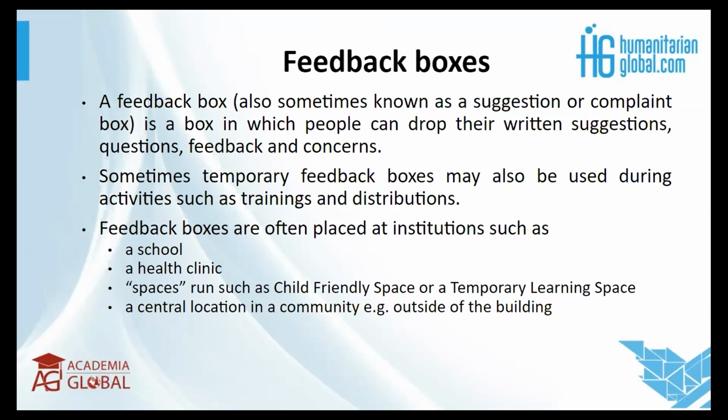On that note, actually, the feedback boxes, especially for schools and health clinics, shouldn't reach a whole seven days, a whole week, before being opened, because there could be sensitive issues of child safeguarding, issues of abuse, issues of rape, which could be written down and not attended to at the right time. So it should be like maybe every other day where it's feasible.